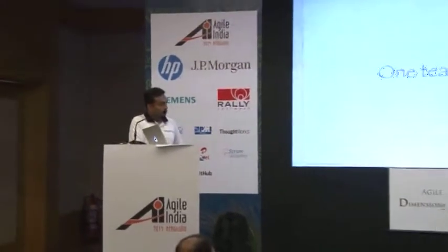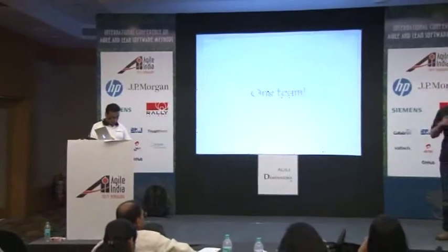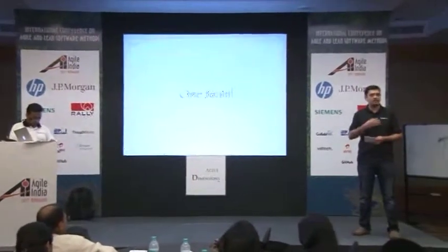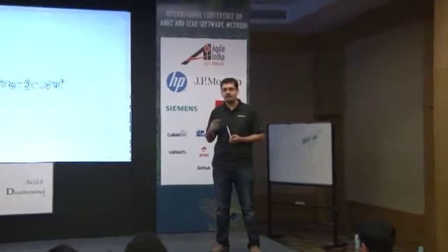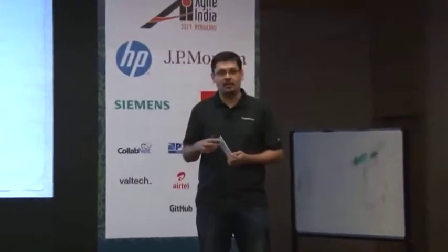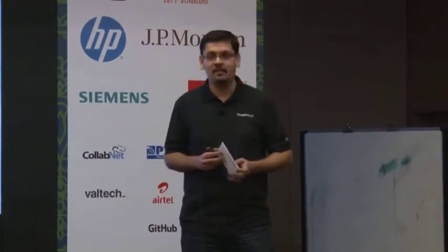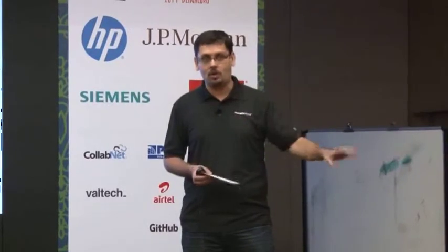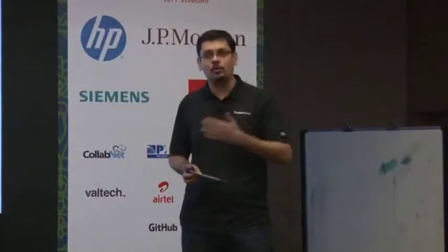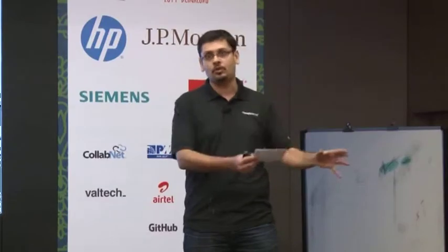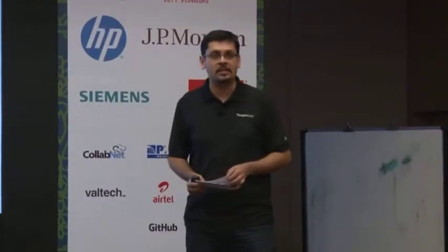Okay. So another one, it might sound like it's a counterpoint, but it's not. When it comes to things like metrics, when it comes to managing the teams, one of the things we do focus on is making sure it's treated as one team. We've been badly burnt by going down the path of onshore velocity is 4 points per week per pair, but offshore is 2 points per pair per week. What is going on? Why is offshore half as productive? I mean, aside from the point that that sort of use of velocity itself is dysfunctional. Just trying to do that and separating those and treating them as, oh, I have an onshore team and an offshore team, I think we found that to be extremely risky and a really bad idea.